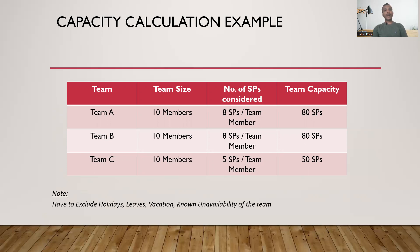We need to remember to exclude the unavailability of the team, which includes holidays, planned vacations, leaves, or any known unavailability. For example, team C might be going through training, cross-training, reskilling, documentation, or getting hands-on experience — that is a known unavailability, which we exclude directly from the capacity calculation.